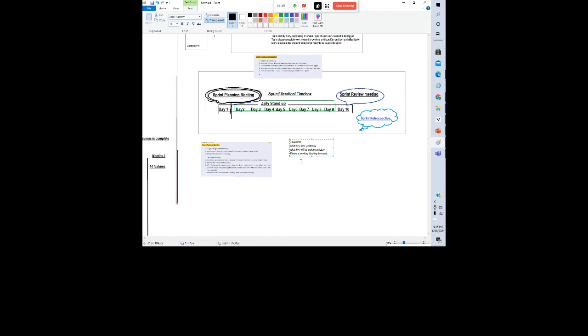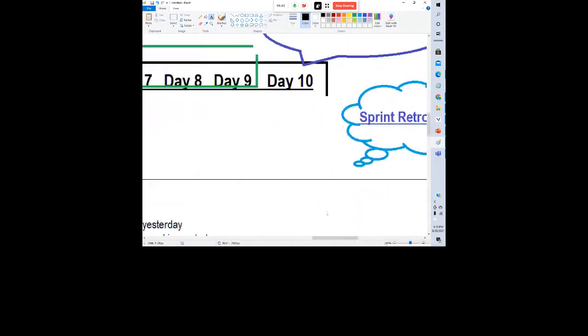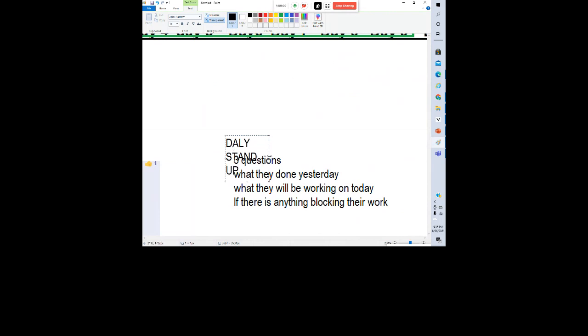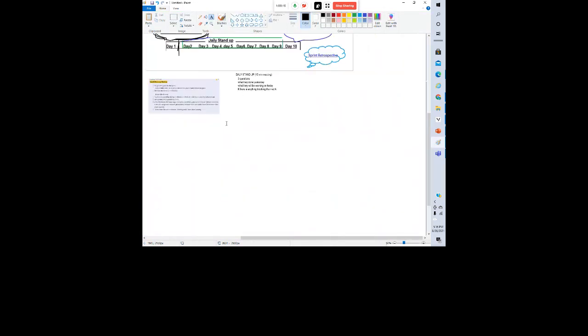So these are the three questions everybody answers in that daily stand up. And why is it called daily stand up? The idea is everybody huddles for 15 minutes, just a 15-minute meeting. Every meeting is time boxed, just like the whole sprint is time boxed.